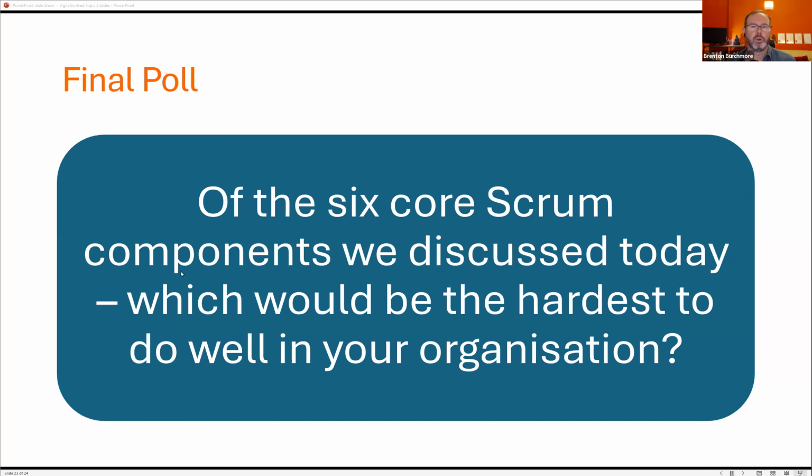Because you will lose so much efficiency out of that, it's going to provide more harm in most cases than you would get out of having two projects going on at once. It's not the sum of the parts. Instead of taking twice as long, it might take 2.5 or 3 times as long. I suppose it all goes down to having the client vision, right.